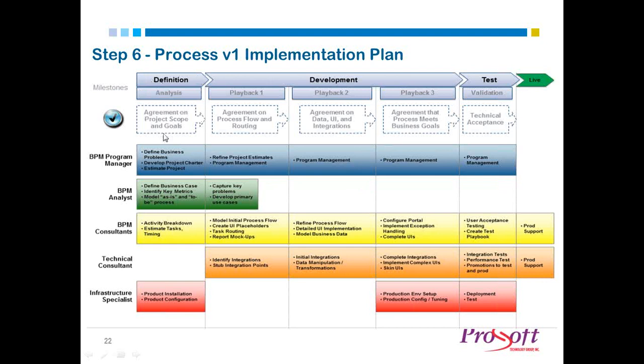But the problem that happens with BPM projects is that you figure out what value you can deliver in 3 months, you build it, you put it in, they start using that little chunk, then you do the next part, and now iteration 2 is put into production, and it ends up breaking iteration 1. So with BPM, you have to really make sure that whatever the design of your process lends itself to continuous process improvement. You have to understand how the data is organized, the data architecture of your process.